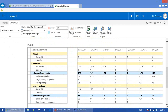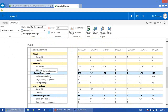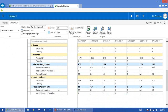Scrolling down shows the projects these people are working on. Availability is how much time you have that you could work — a negative number means over-allocated. Capacity is how much time you have according to your calendar, with the default being five days a week, eight hours per day. There's also a resource engagement concept for non-project work called Business Operations. For example, Lori at 90% business operations doesn't have much time available for project work, while Bob at 25% business operations has more time available as a subject matter expert on projects.